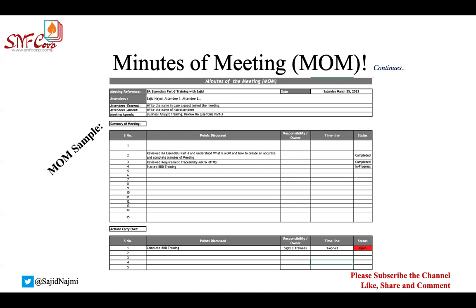So whatever points you're getting during your meeting, you will see who will be the right person to work. Talk to the person. Without informing, do not write their names. Inform them, okay, hey, I'm going to write to make you as an accountable or as an action owner. Is that okay to you? Person will say yes, no, or probably say differently. And then once you agree, you will write their names here. And then the status is open. This status is open, completely open. We have to still work on these things.